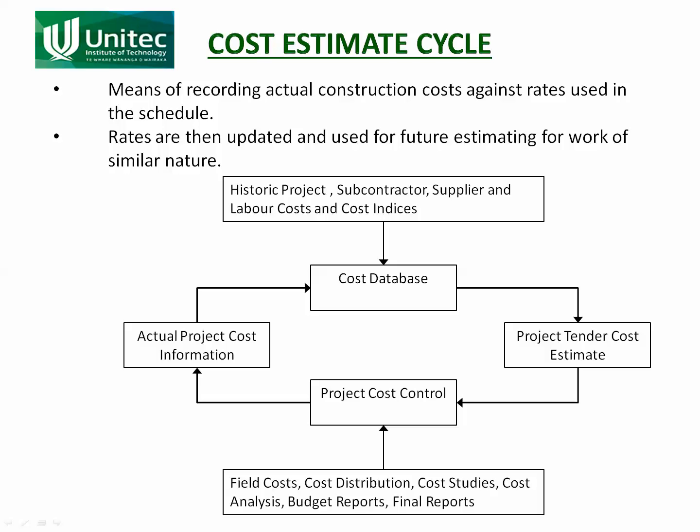It's a means of recording the actual construction costs against the rates used in the schedule. The rates are updated and used for future estimating. So you can see there's a circuit there. It starts at the project tender estimate. So you put your tender in, you estimate it, you put in your contract price.